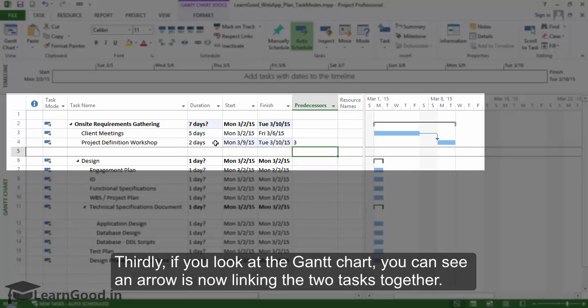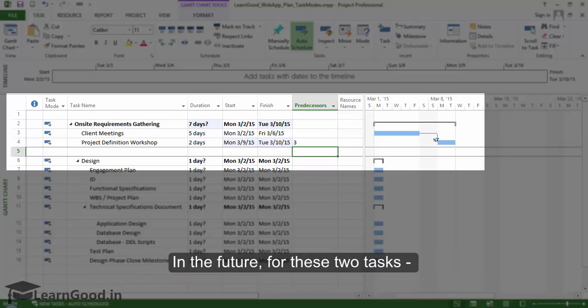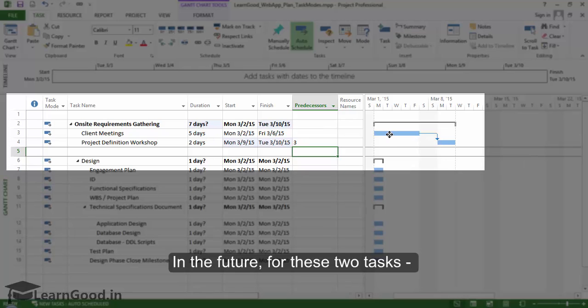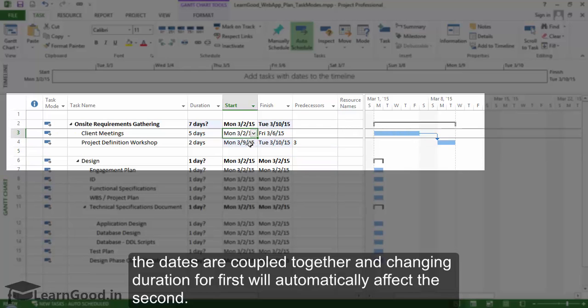Thirdly if you look at the Gantt chart you will see an arrow is now linking the two tasks together. They have been effectively tied together. In the future for these two tasks the dates are coupled together and changing duration for first will automatically affect the second.